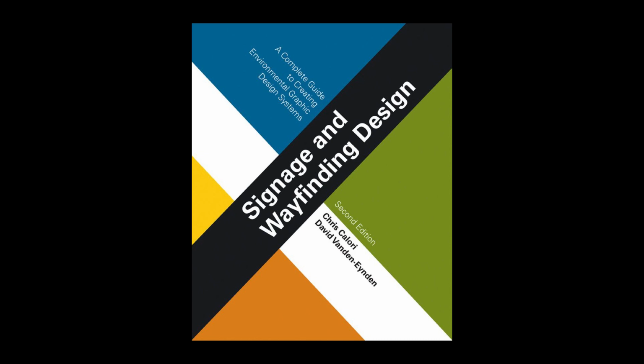Bid form development. Bid forms provide a standardized means for all bidders to submit their bids, easing the task of bid comparison and analysis. The EG designer can advise the contract rep on how to devise the bid form for the project, or can provide the bid form to the contract rep. At C&VE, we favor unit pricing for bid forms, since unit prices provide much more information for bid comparison than a single lump sum for the entire fabrication contract.